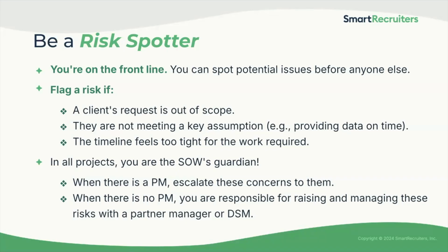As a consultant, you're on the front line of the project. This means you can spot potential issues before anyone else. You should flag a risk if a client's request is out of scope, if they aren't meeting a key assumption like providing data on time, or if the timeline feels too tight for the work required.